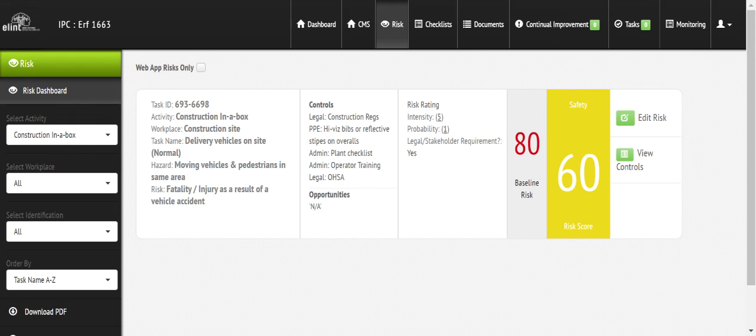So if you've done your risk assessment here, you've actually done one of the things that they've asked you. But there's quite a few things that they also ask you in the specifications, which would be in line with what your risk assessment picks up. In the specifications, they're going to say, if you use plant and equipment, you need to have a checklist to monitor the condition of the plant and equipment. So here you can see we've identified that in our risk assessment as well.